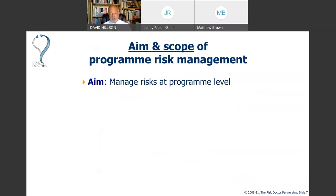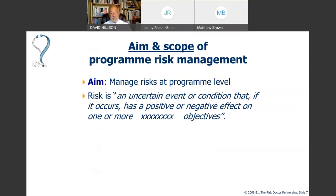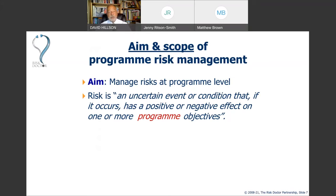The aim of programme risk management is to manage risk in programmes. Using the PMI definition, risk is an uncertain event or condition that if it occurs has a positive or negative effect on one or more objectives. By changing the type of objectives we're interested in, we change the type of risk we're considering. A project risk affects project objectives; a programme risk affects programme objectives — in the same way that strategic risk affects strategic objectives, personal risk affects personal objectives, and financial risk affects financial objectives.